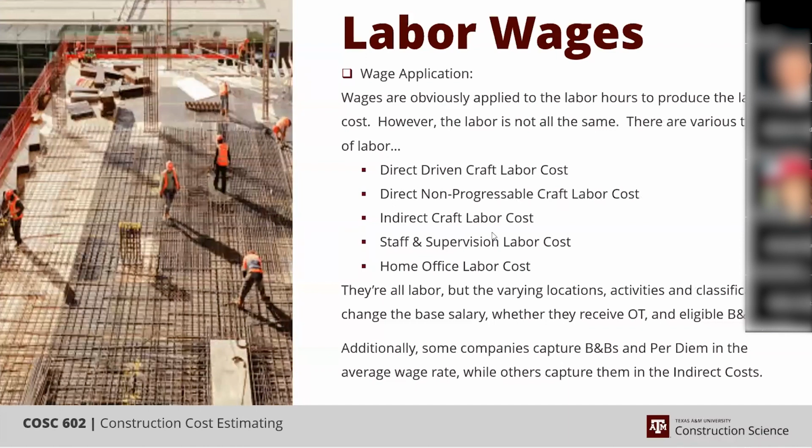All right. So once that's done, you have your quantities, you apply your unit hours against those quantities, and you'll have your extended hours that represent US Gulf Coast. You apply your productivity factor against that, and you'll have your site hours, the hours that should be required to install things at your unique site. Now, what's left at that point is to apply a wage rate. Wage rates vary, and they vary for a number of reasons.